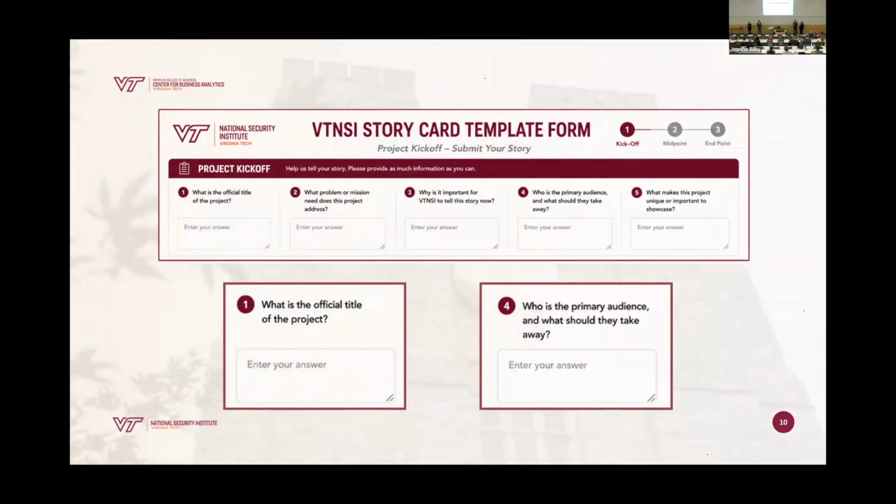One thing which became clear when we spoke with the researchers is that research is iterative, but the scope can change very quickly. We needed to capture the value of what they were doing, but we couldn't do it in a soup to nuts fashion right up front because the scope of the work can change very quickly. But with that being said, we did have to group it into broad categories. So we did settle on a kickoff, midpoint, and endpoint, which all had different lines of questioning.